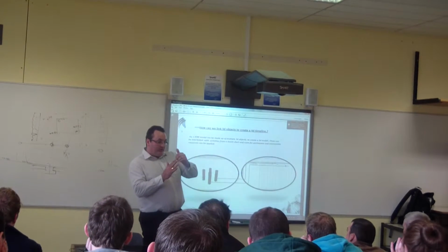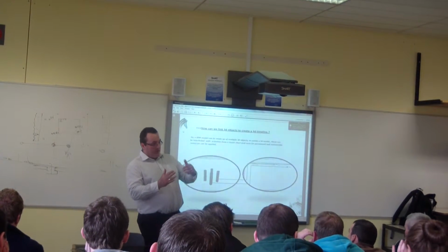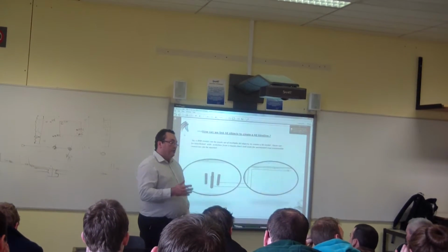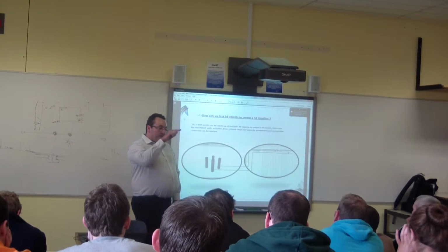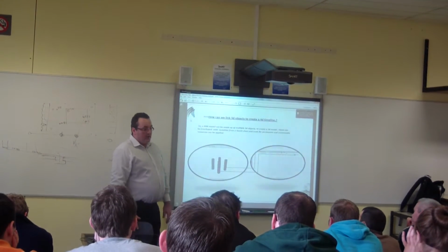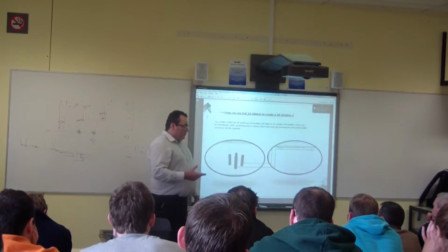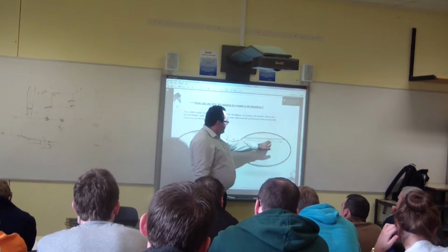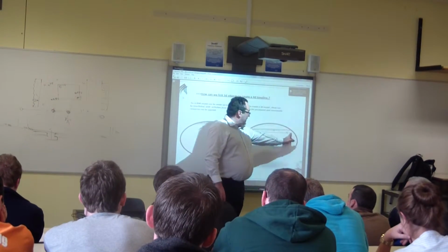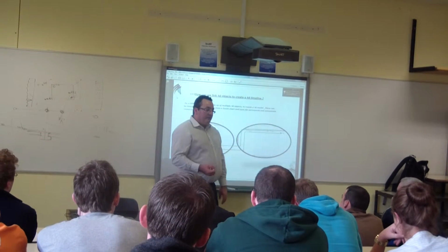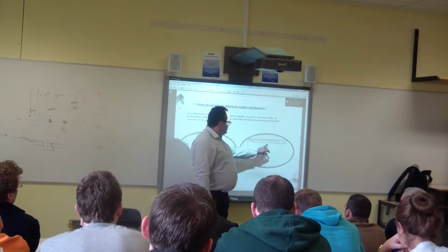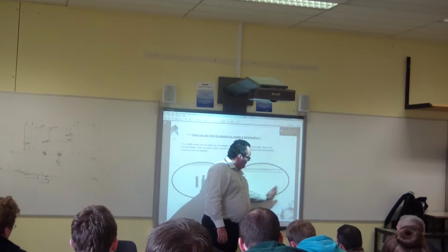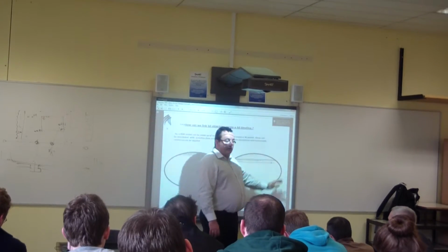So if it moves out from the delay because the architect didn't actually talk to the structural engineer, that's your payment milestone. His payment milestone's there, and you can see that in the graph. That's your cash flow, and the cash flow is derived from what we call earned value analysis. We earn the value on site. So when we actually start building this stuff, we want to then go for payments. We do that by sectional milestone dates. And we have a little graph up here as well showing our planned costs and the actual cost, depending on our performance on site.